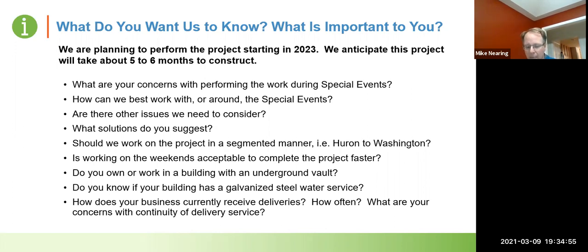And that's an example where working at night might be an absolute necessity. Like some of these shutdowns that we might need to do along South Main Street, especially one area that really comes to mind is between William and Liberty. I know there's several restaurants in that area. So we would be working with you, and those might be areas where we would do shutdowns at night in order to minimize